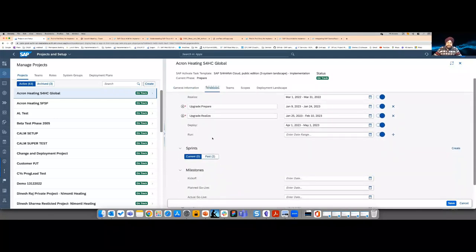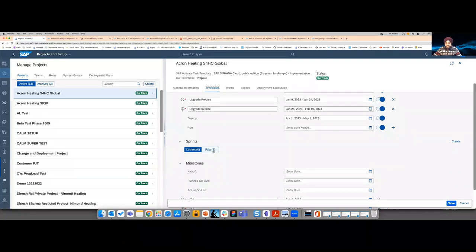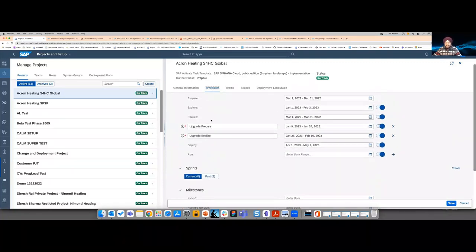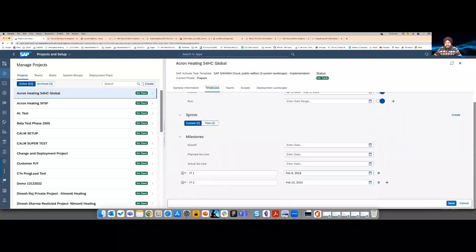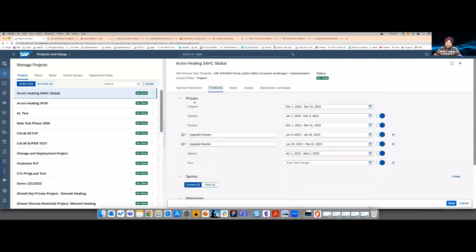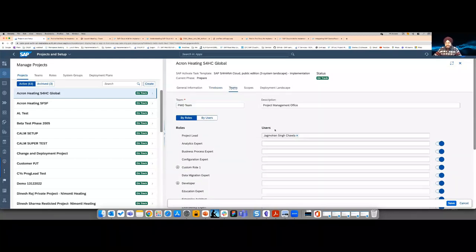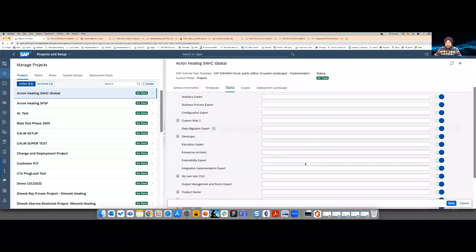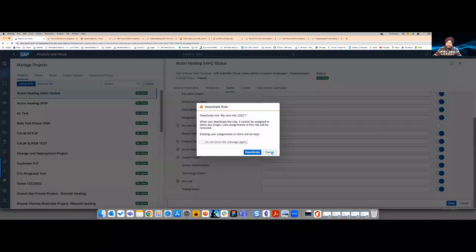In the time boxes section, you have phases with start and end dates, custom phases shown with a special icon, and optional sprints that align to phases automatically — when you maintain a sprint's time, we automatically match it to the correct phase. The same applies to milestones. Then in teams, you can have as many teams as you want; each team has a role list. If the role list is too long, you can deactivate roles to simplify, or if too short, add custom roles.